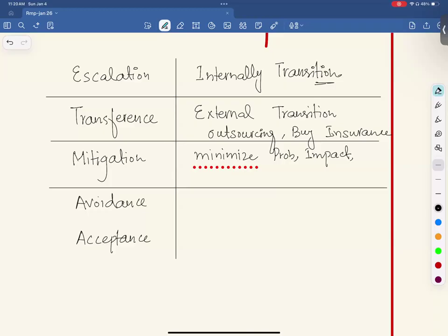Sir, can we say doing some activity earlier to avoid the cost increment in the coming days, like ordering material proactively? Yes, that's procurement. As per historical data, if we place orders in December, we are at the price of $100. But if we are able to place orders in June or August before December, then we will get the same thing at $90.